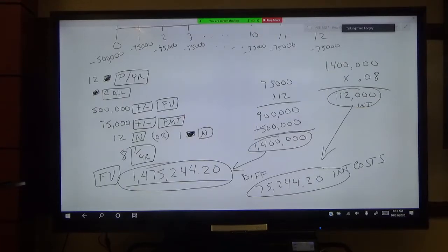Well, a lot of times what will happen with these fixed price bids, saying once again the job is going to be a $100,000 job, is that the contractor will come in and do what they think needs to be done, but maybe they don't do it according to how the developer would want it done in terms of the quality of materials, or something that wasn't specified.